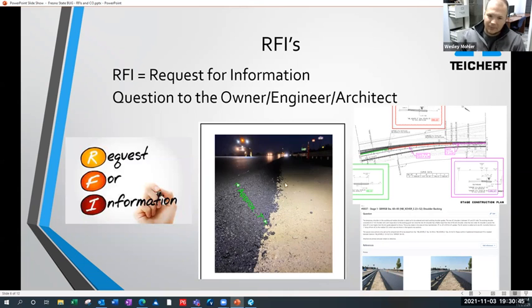First you have to generate the backup though. So you take a picture out in the field. I use Bluebeam to mark this up and give a visual demonstration of what that thickness really was. And then on the plan set, we use just basic tools like line work and measuring and screenshots, and put together the 3 different areas that were affected by this and what the cross sections, the other plan sheet showed, and how there wasn't supposed to be dirt here. This was supposed to already be filled up, but it wasn't.